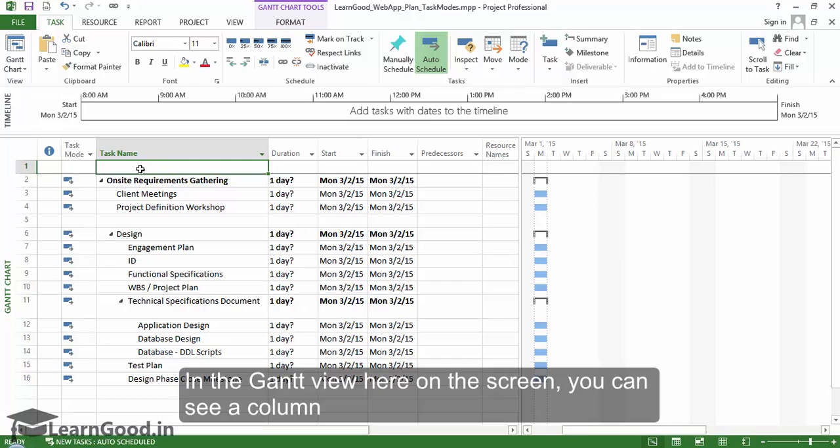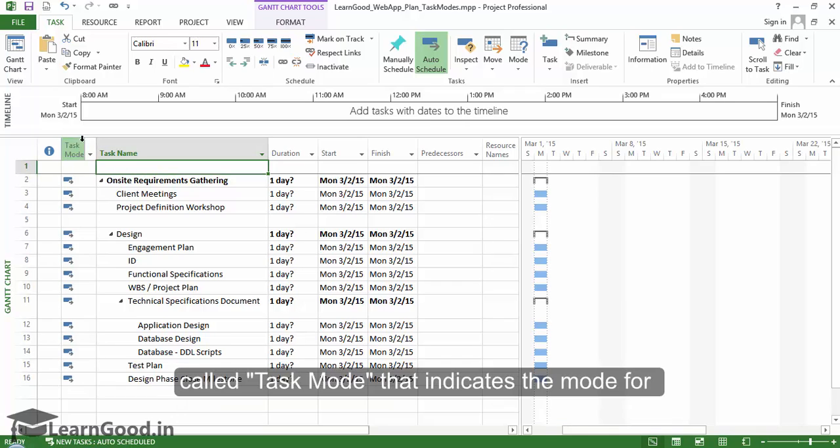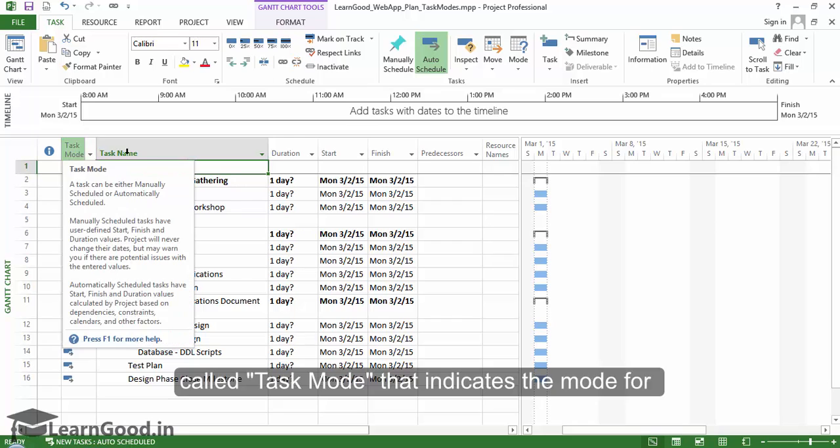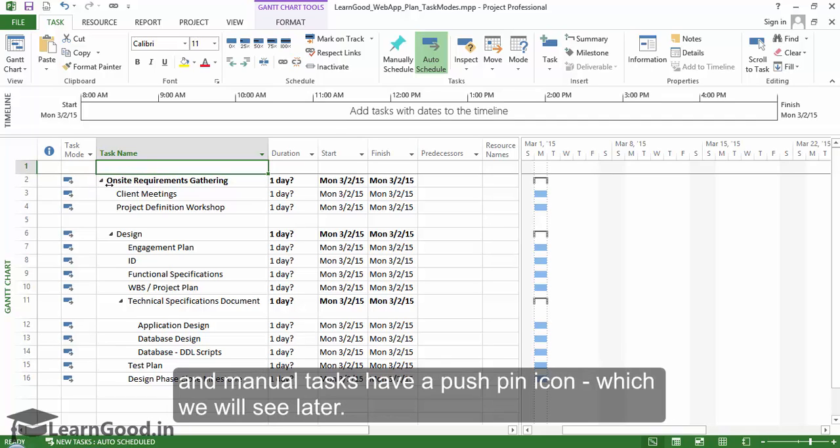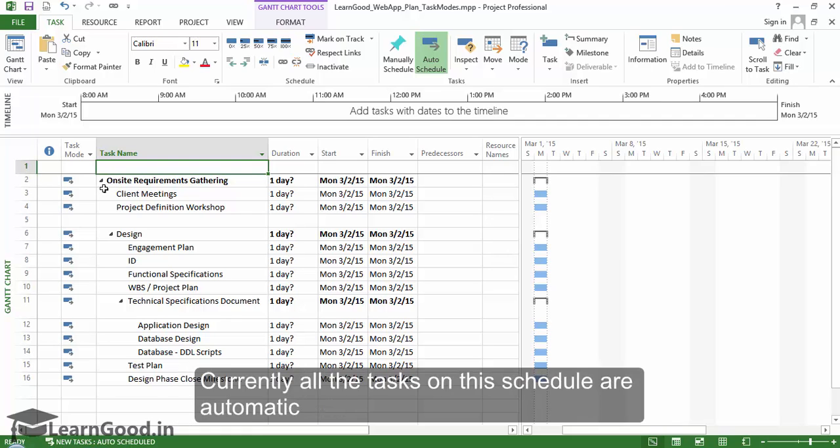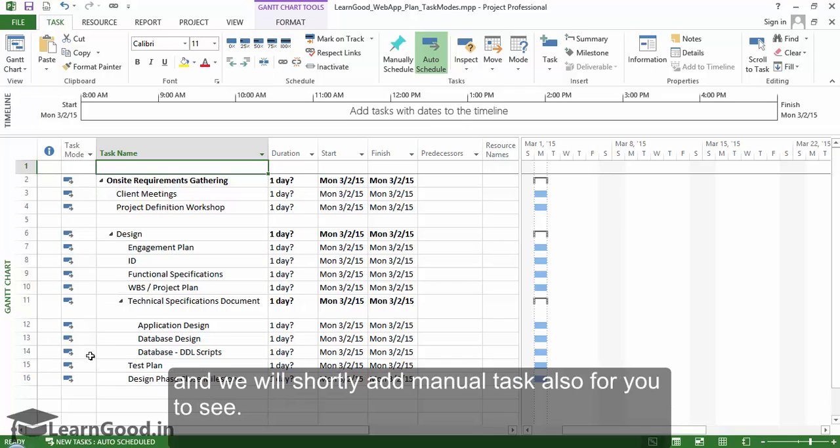In the Gantt view here on the screen you can see a column called task mode that indicates the mode for each task row. Automatic task has this blue box with a small arrow icon, and manual tasks have a push pin icon which we will see later. Currently all the tasks on this schedule are automatic and we will shortly add manual tasks also for you to see.